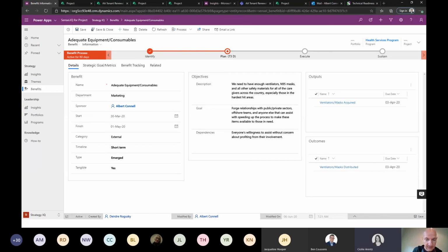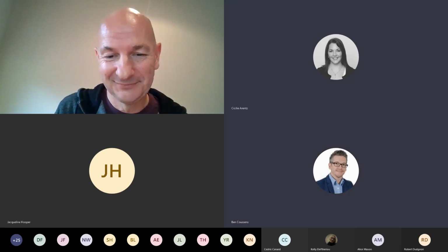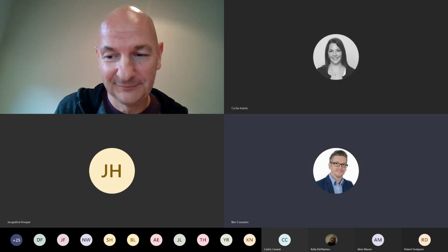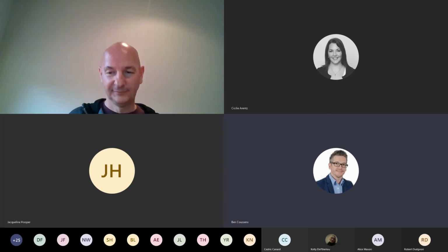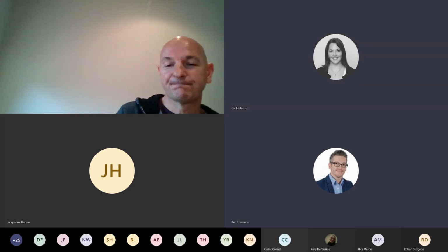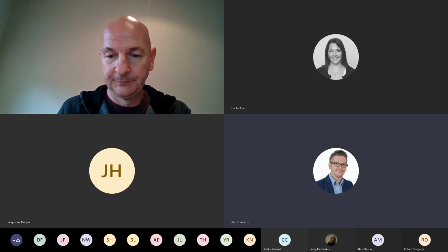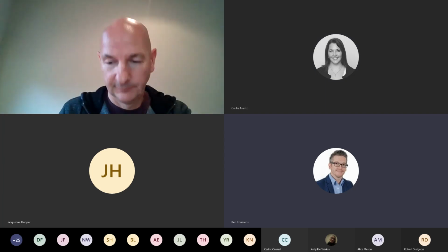Thanks, Mark. Ben, any other questions from the chat area that we haven't covered off yet? No, another one came through about can we template? Yeah, we can copy projects now. So we can create template projects and then just copy those. Yep. That's right. And it keeps all of the relationships and the effort. It just doesn't keep things like actuals if there are actuals and things like that.